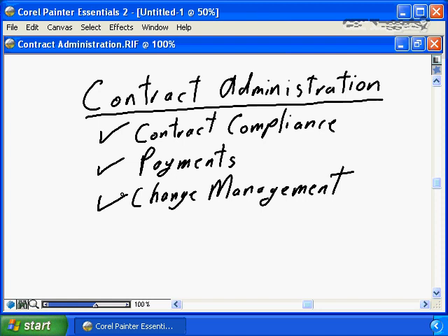So back to the scenario that I described earlier, had I executed change management, and had I executed the change that says status reports will no longer be weekly at noon, status reports will be biweekly Fridays, there would have been no cause for termination with cause, and if the customer had wanted to terminate the contract, there would have been penalties for early termination. All payments, all outstanding invoices would have been paid, and my company would have been far better off.